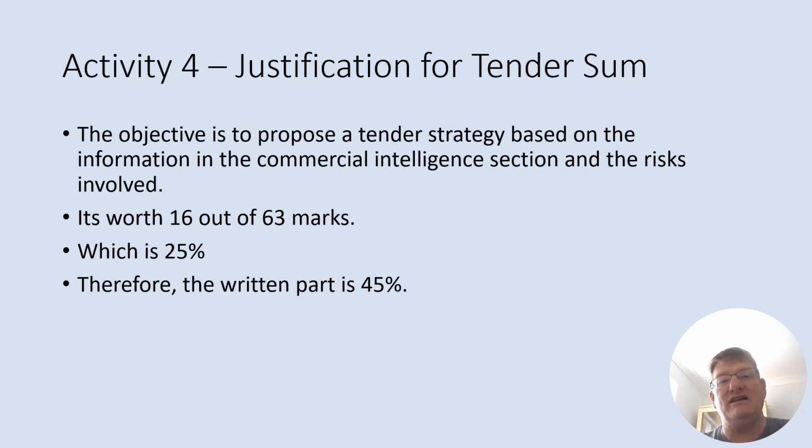You also need to add in commercial intelligence, because you'll be given some competitors, and you've got to write about those competitors. You'll know who those competitors are, because you'll ask suppliers in the area, has anybody else approached you with regards to this sort of tender? You also need to look at your current workload and your overheads for your office. Are we covered, or do we need to really win this contract to cover our overheads?